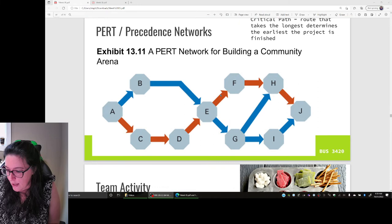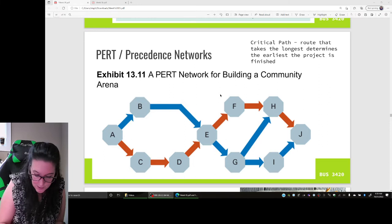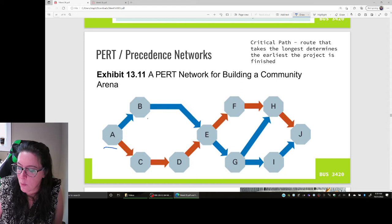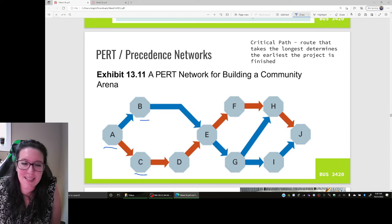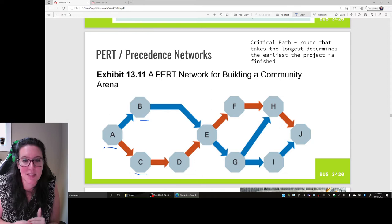If you are creating a precedence network, it would look something like this — A happens first. B depends on A, so B can't happen until A happens. C depends on A, so C can't happen until A happens. But C does not depend on B — they can happen concurrently, at the same time.